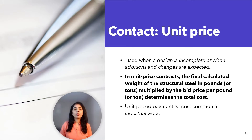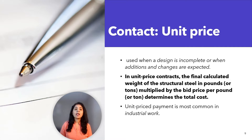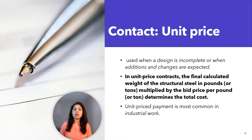Another basis of payment is unit price, frequently used when a design is incomplete or when additions and changes are expected. In a unit price contract, the final calculated weight of the structural steel in pounds or tons multiplied by the bid price per pound or ton determines the total cost. Unit price payment is most common in industrial work.